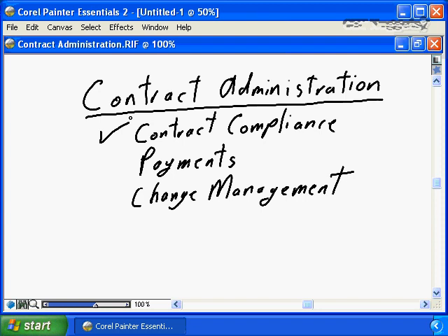And by something as simple as not adhering to a term and condition in the legal part of the contract, they were able to terminate with cause, and my company had to walk away from the contract partially completed with substantial work outstanding, substantial bills outstanding, simply because status reports were not produced according to a schedule, and I had not executed the proper change management to ensure that the contract was being completed according to details in the contract. So whether you're a buyer or a seller, be aware of all of the terms and conditions in the contract, both the statement of work and the legal aspects of the contract, and ensure that you're in total compliance with the contract.